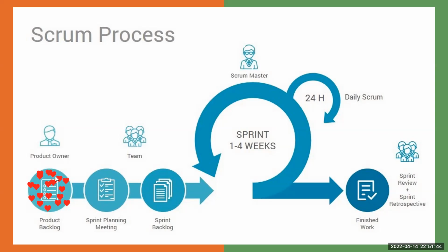But you're not going to do every single one of these things in a sprint. So what you're going to do is you're going to have a sprint planning meeting and you're going to say, we're going to do 1, 2, 3 things during this sprint. What's the most important things? This is called grooming the product backlog. What are the 3 most important things that we can do? We're going to do them here. And it's all we're going to focus on during this sprint.